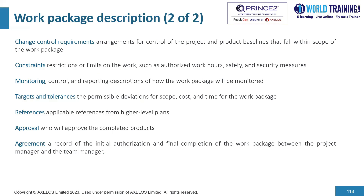The work package description also covers any limitations or restrictions on the work, such as authorized work hours, safety and security measures. It includes monitoring, controlling, and reporting descriptions of how the work package will be monitored. Targets and tolerances document the permissible deviation for scope, cost, and time for the work package. References cover any higher-level plans that need to be referred to. Approvals indicate who would approve the completed work, and agreements record the initial authorization and final completion of the work package between the project manager and the team manager.